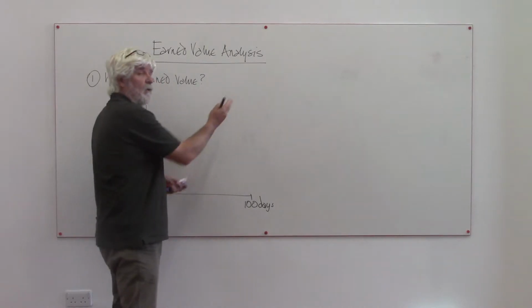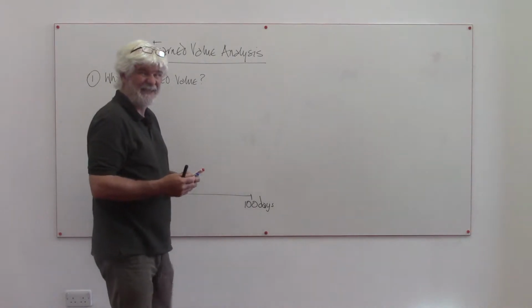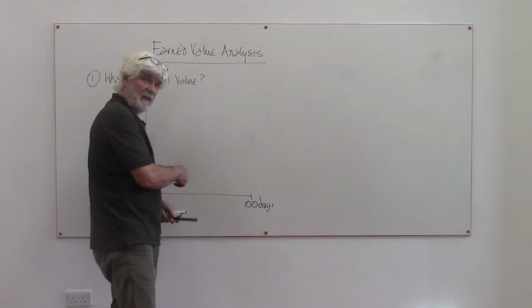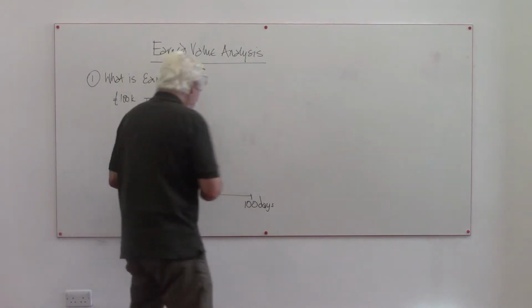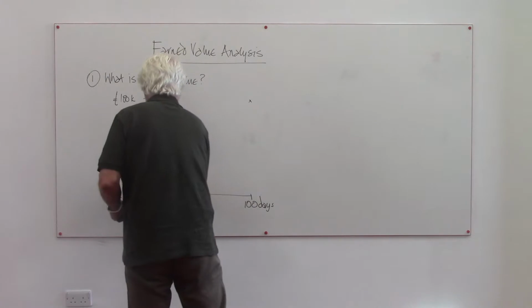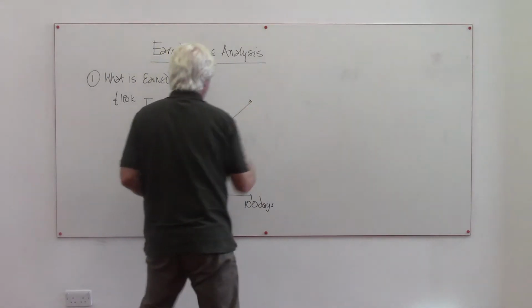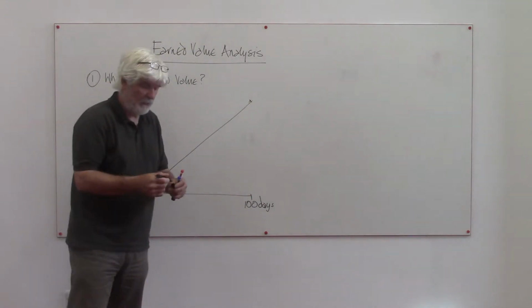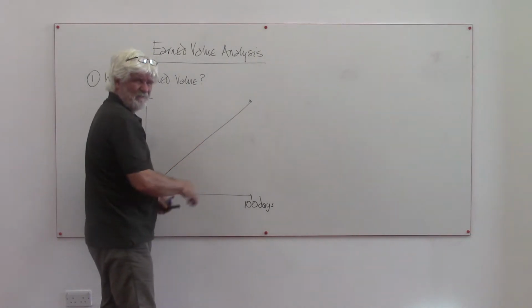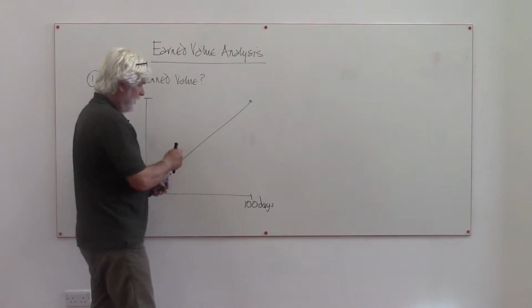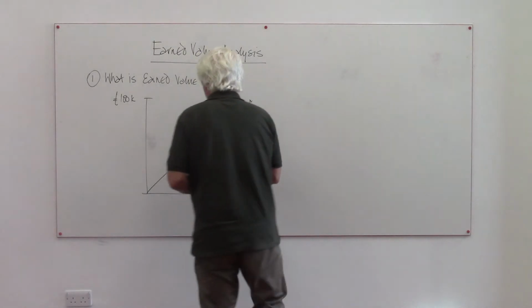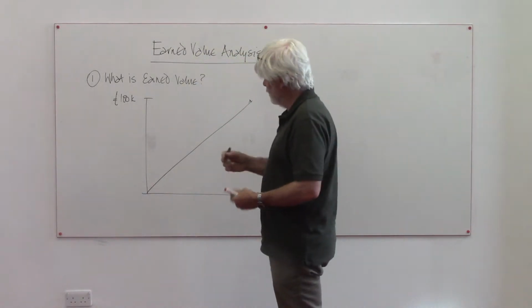Now, if you've read some project management, you might know that typically the cost profile for a project is an S-shape or S-curve. You might have heard that term. I'm distorting it to keep the math simple. It's just going to be a straight line, isn't it? So it's going to go to here. That's supposed to be a straight line. A straight line would practically be an S shape, but in this example, it's a straight line.